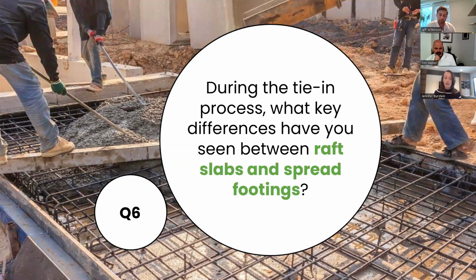With a raft slab, and in particular a raft slab that is bathtubbed, you don't want to have any penetrations, of course, in that interstitial space. So when Diverso comes to do their horizontals, they actually have the site to themselves. They're connecting all of their horizontals and bringing that up, like you mentioned, outside of the raft. So there's a bit of coordination in advance. I would say if you can give the geothermal horizontal line a bit of space, and I think, Tim, it's like 8 inches, right?